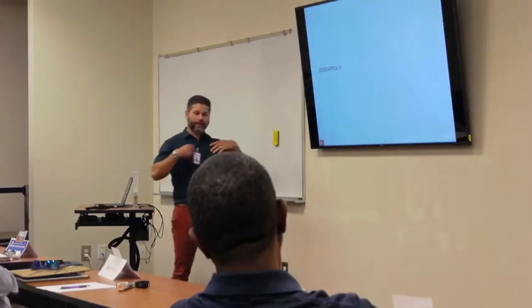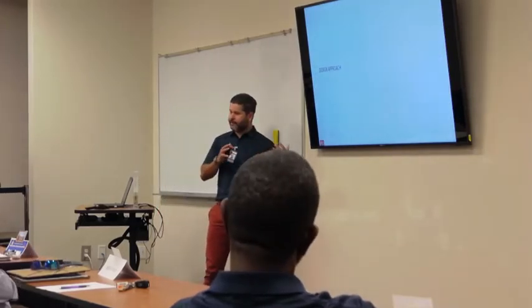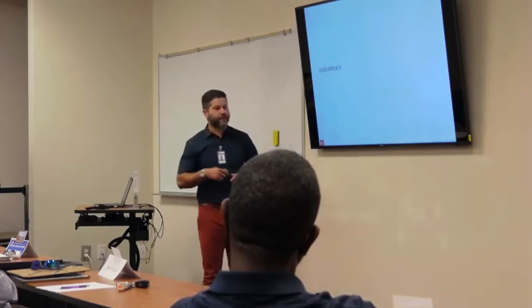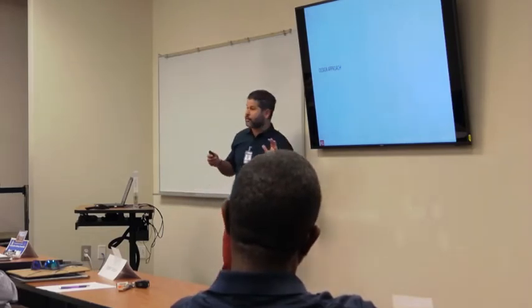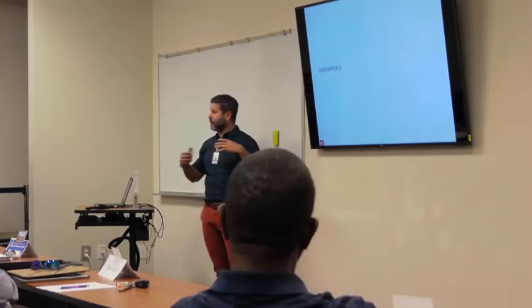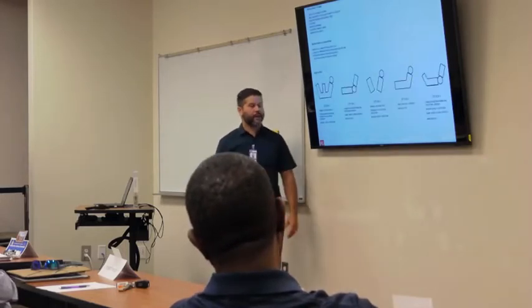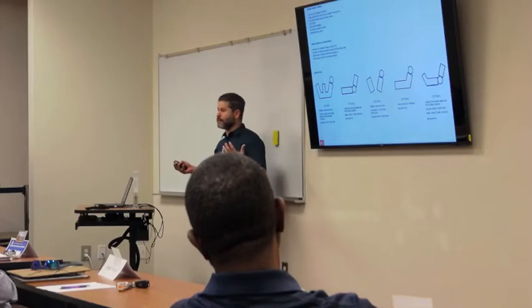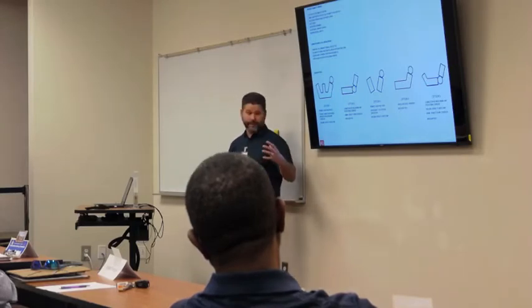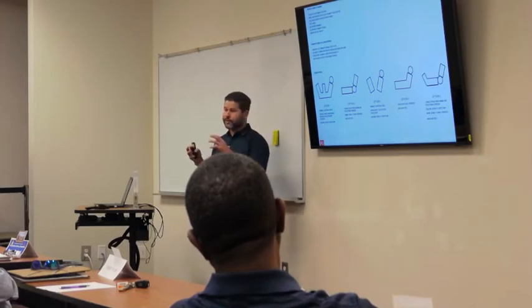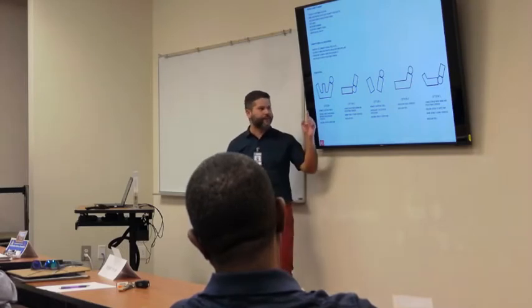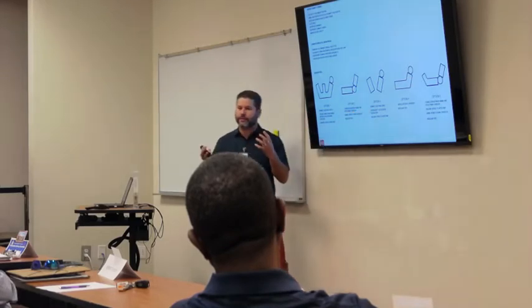So then we have another meeting, right? We consolidated all this information in the first meeting. So we're going to do another meeting which we call design approach. So let's talk about how we start refining what we discussed. What we like to do for this is present multiple options, right? Multiple options that tackle these different aspects, but that can also be used in the selection process to say, well, I really like option 1, but can we mix it with option 3, just to understand all the parts and pieces.